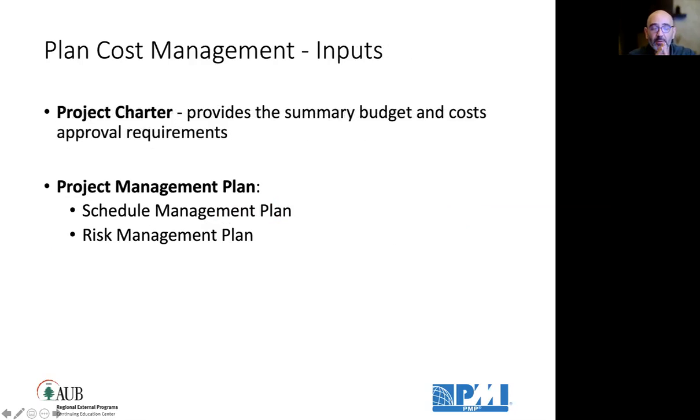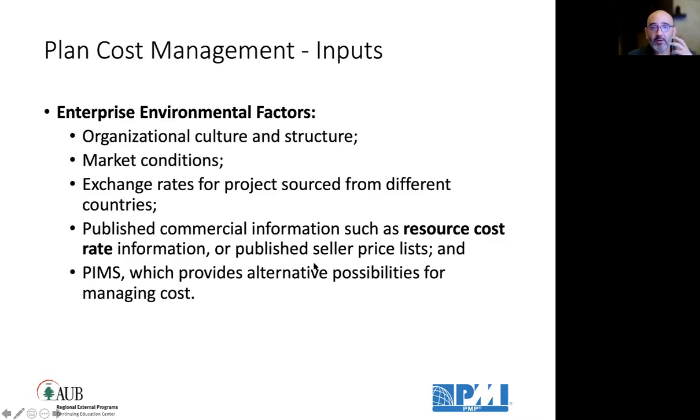To develop the cost management plan, I need the project charter that provides a summary, a budget, and approval requirements on costs incurred. I need the schedule management plan, and I need the risk management plan because it has strategies that might incur additional costs. EEFs like the organizational culture and structure, marketplace conditions, exchange rates, published commercial information with resource rates, resource cost, sellers' price lists, and your project management information system that provides alternative possibilities for managing costs.